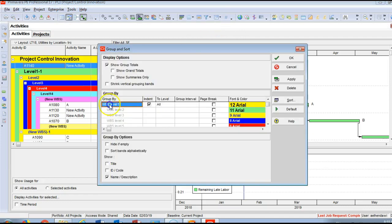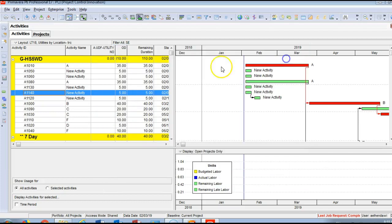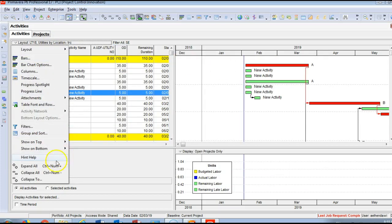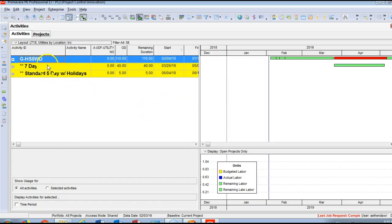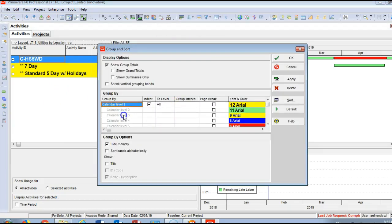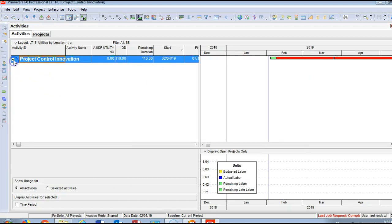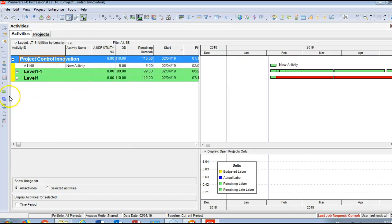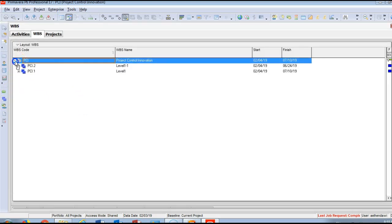The Group and Sort feature is important. Currently we're grouping and sorting the project by WBS. Let's try grouping by calendar: select it, click Apply, then Collapse All — so you can group activities by their assigned calendar. You can go back and group by WBS again, and on the left side you can navigate your WBS levels and see all the WBS nodes created previously.